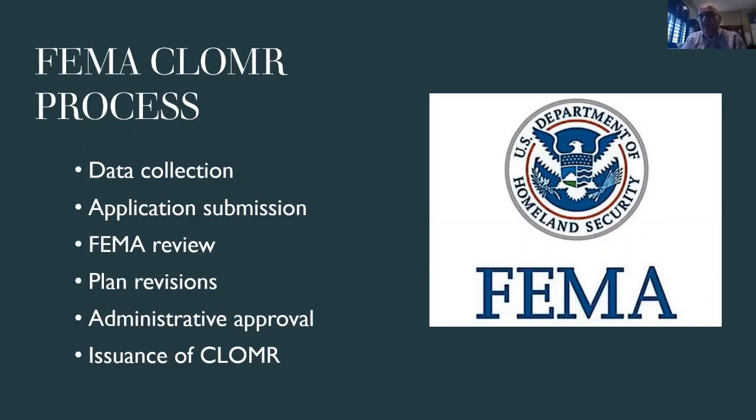Although it's very extensive, it really provides a good permitting process before any project is built. It includes data collection, application submission, FEMA review, plan changes, and finally issuance of the CLOMR.